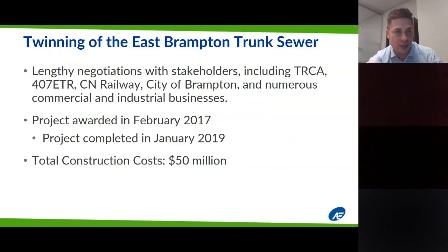So the design of this project was actually awarded to AE in 2013. And then in February of 2017, the project was tendered and awarded to the contractor. The project was completed actually ahead of schedule in January 2019, just after the new year. And we're actually heading into the warranty period, or ending the warranty period here in the next couple months without any, knock on wood, issues. So the total construction cost was about $50 million.